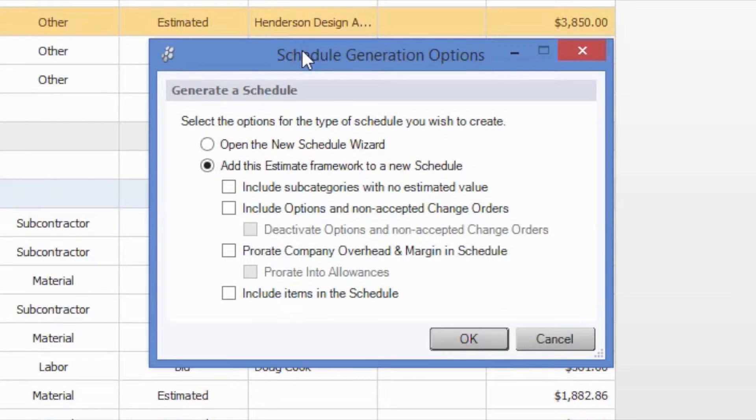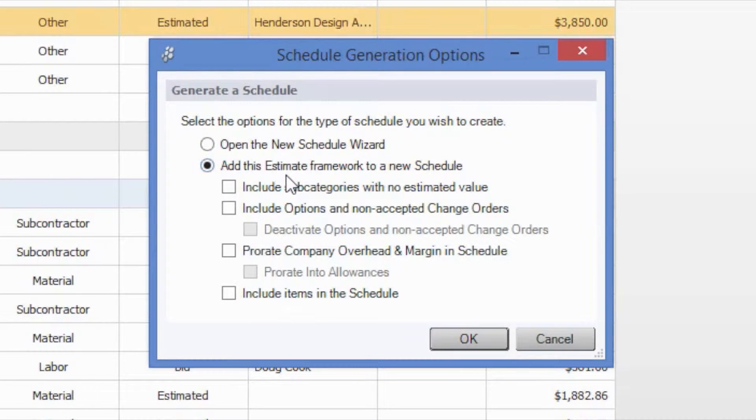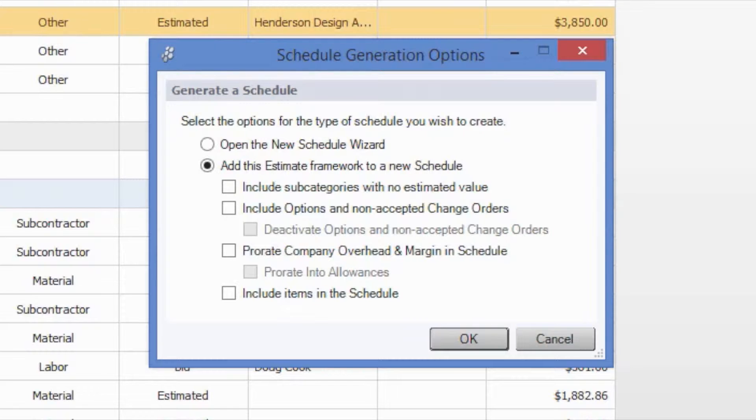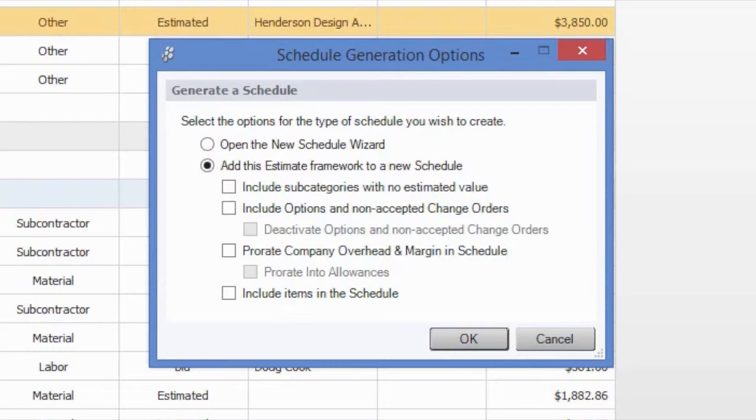When we click this, as you can see, the option is selected for us to add this estimate framework to a new schedule. By default, what this means is that our categories will become scheduled groups and our subcategories, things like design services, permits, lot costs, etc., will become scheduled tasks.